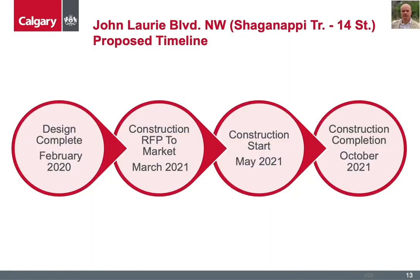Thanks, Rhys. In terms of schedule, the detailed design has been completed along with the construction and tender package preparation. The procurement and tender process has started, with the project being issued on the market in order to receive construction bids. Construction award and selection of contractor is expected at the end of April 2021. Construction is scheduled to commence by mid-May 2021, with construction completion planned for October 2021. Various lane closures and speed reductions throughout the construction limits and duration of the project will be expected. As well, there will be delays and traffic impacts for commuters traveling in the area. We would like to thank commuters and the public in the area in advance for their patience during construction of this project.